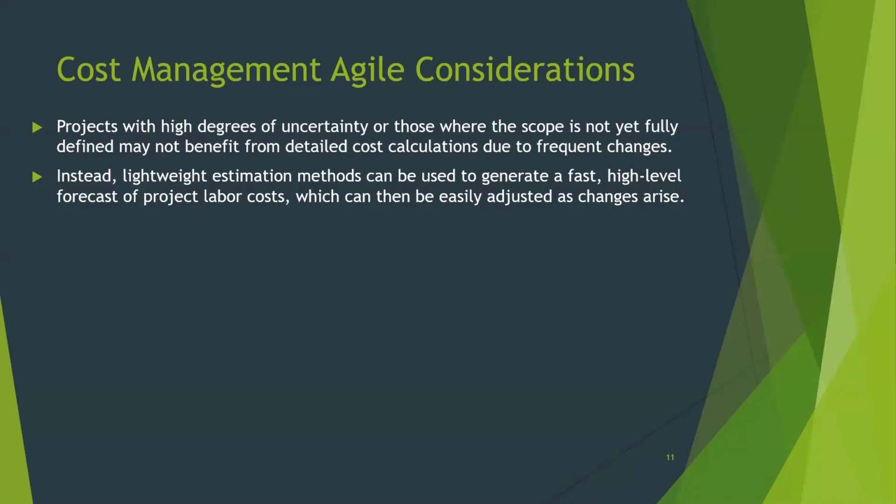complexity, the expected complexity of the requirements. So something simple might get 1 point. A more medium complex requirement might get 3 or 5 points. A more complex requirement might get 9 points or something like that.